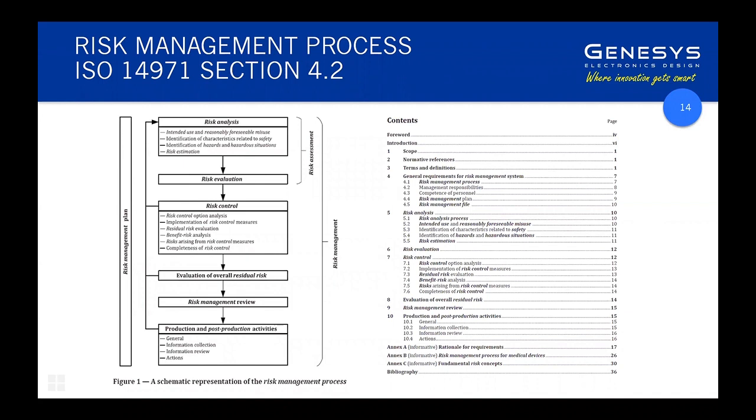So an engineer can obviously work out what electrocution might cause, but when you look at 60601-1, it looks at electrical leakage currents within the context of invasive cardiovascular procedures where much lower currents can cause harm. When you come to biological hazards, for example, or infection control, you really do need to engage with the clinicians to be able to work out what the harm scenarios are and what their severities might be to enable you to determine what the level of risk is.